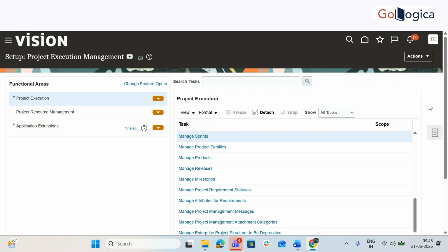After 3 sprints, if the client feels that still there are major changes coming in from our users, and they want to see the complete cycle which is best fit, means out of 10 cycles that we have shown, 9 have been approved, then fine, we don't need one whole sprint, 1.5 months of duration for a sprint. That costs the client a lot. That is why they tell, okay, only 90% of the cycles are approved, we can go ahead for that one cycle. You can demonstrate in a single session, you can arrange a one-on-one call and you can demonstrate that. But if only 50% of the cycles are approved by the users, definitely we cannot go ahead with the next stage, next phase.